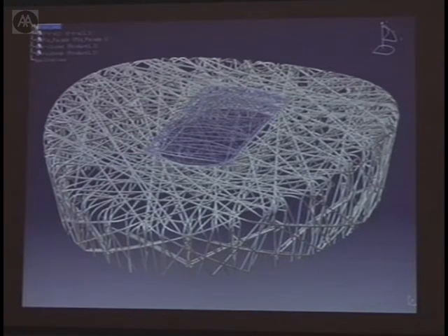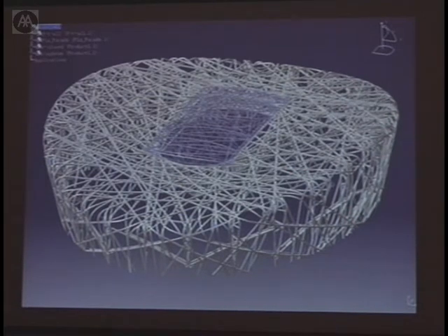The even scarier thing is that this stadium is actually going to be carved up into 4 pieces, and 4 different corners are going to be awarded to 4 different general contractors. And you're going to hope that at the joint, the seam, or one is going to be faster, so you're going to have a bit of stadium, half-built stadium, no stadium. It's going to be a cool design.